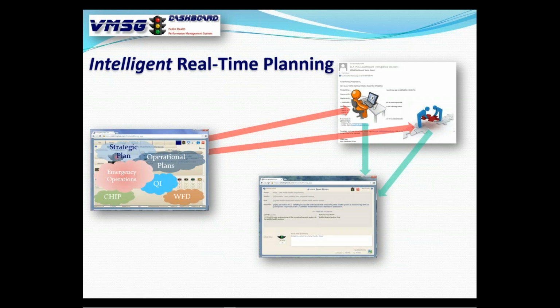So if you've got 5 activities in there, you're going to cycle through those, and then you log out, you're done. This whole process, literally, on average, takes between 3 and 5 minutes per person per month. So if you have them set up once a month, you're only asking the people to contribute 3 to 5 minutes to keep their particular activities up to date. And this is how we keep all the information alive in the system. This is the core of it here.